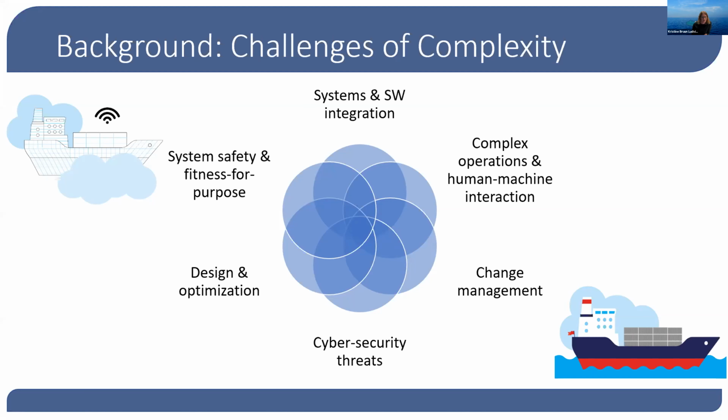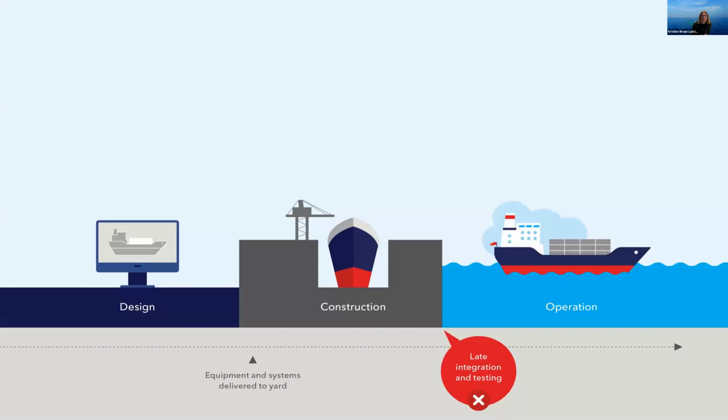And simulation doesn't directly address the cybersecurity, but may facilitate the increasing need to update and patch systems on board. So, looking, for instance, at the typical timeline for traditional ship design today, we know that integration tests are typically conducted towards the end of the construction phase, and that gives us minimal room for changes in the design.